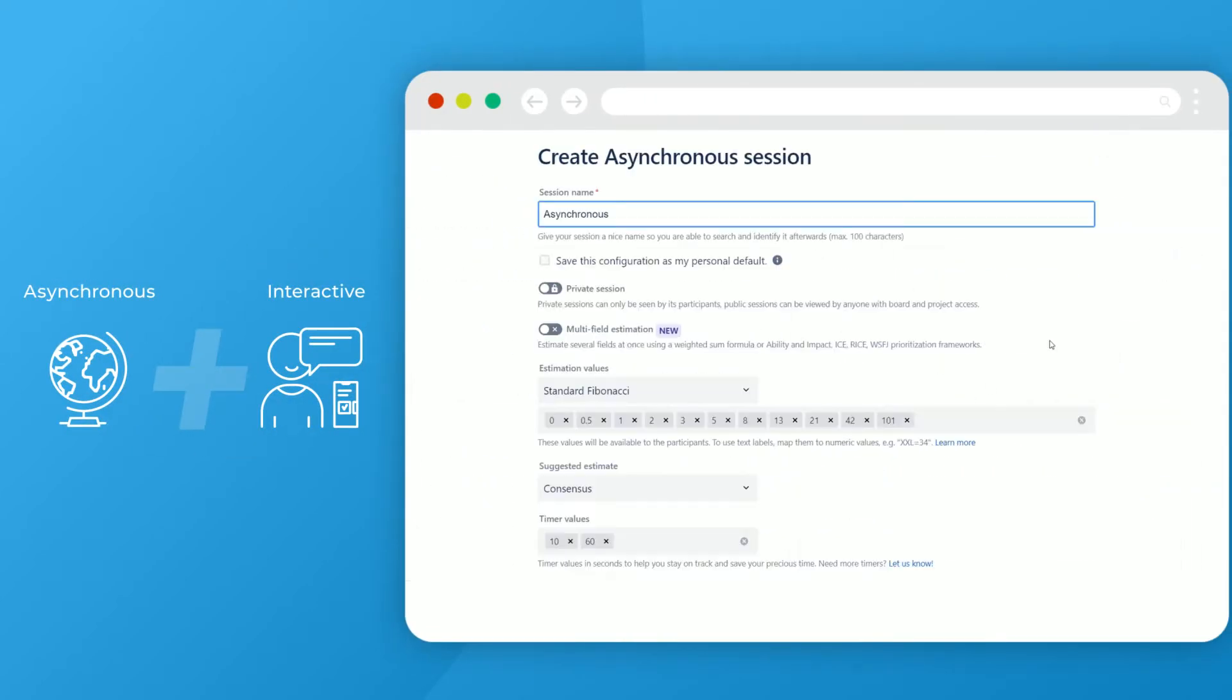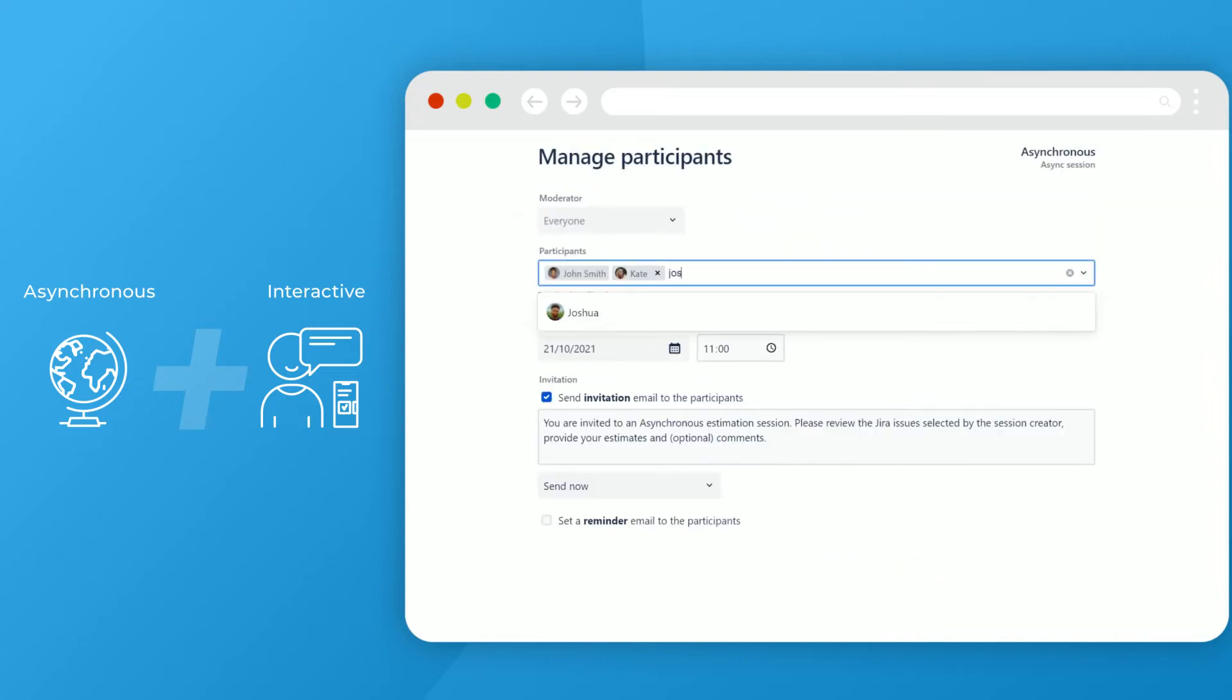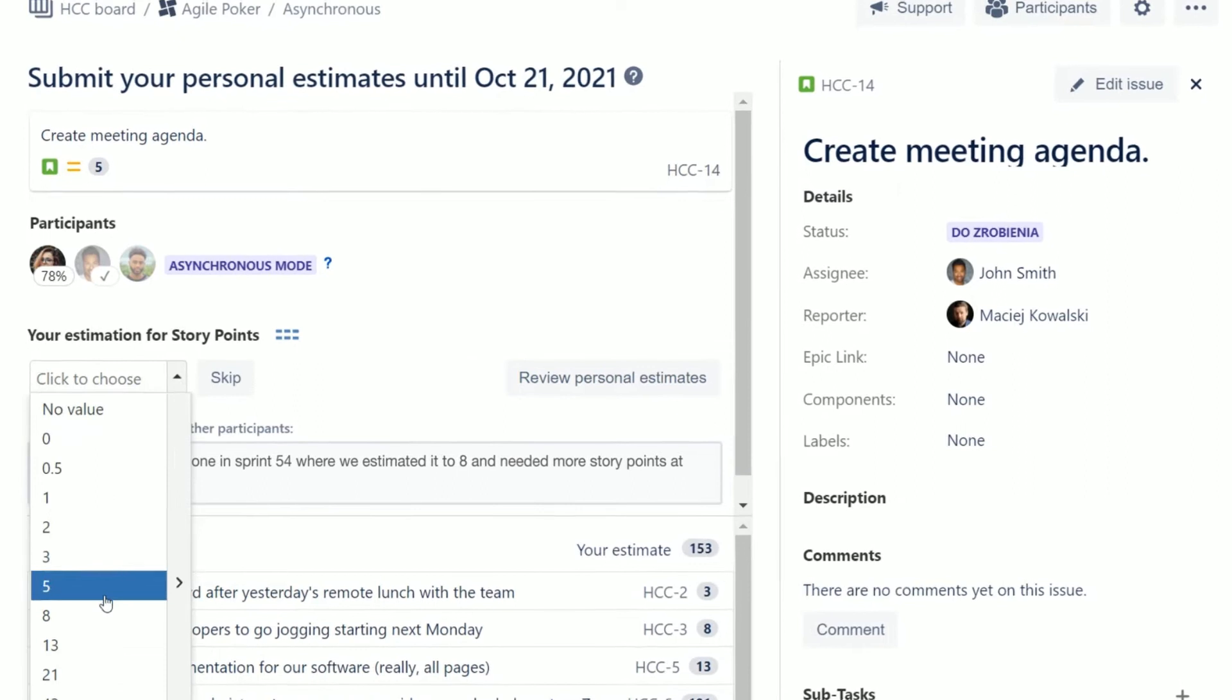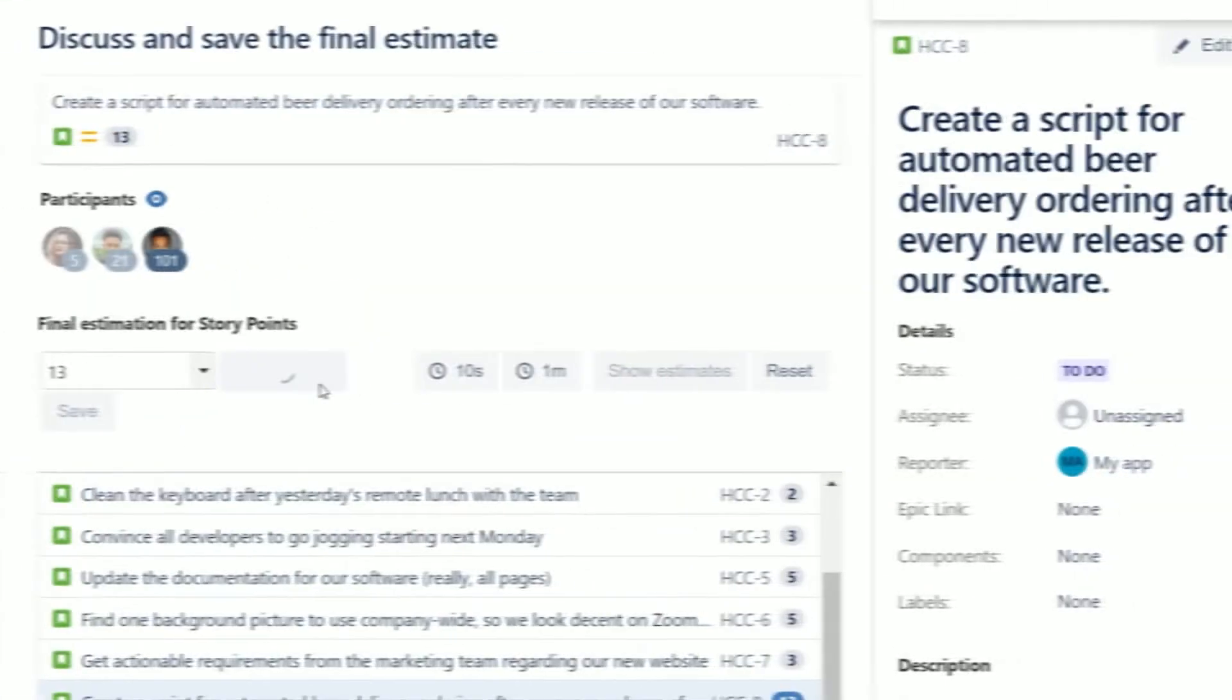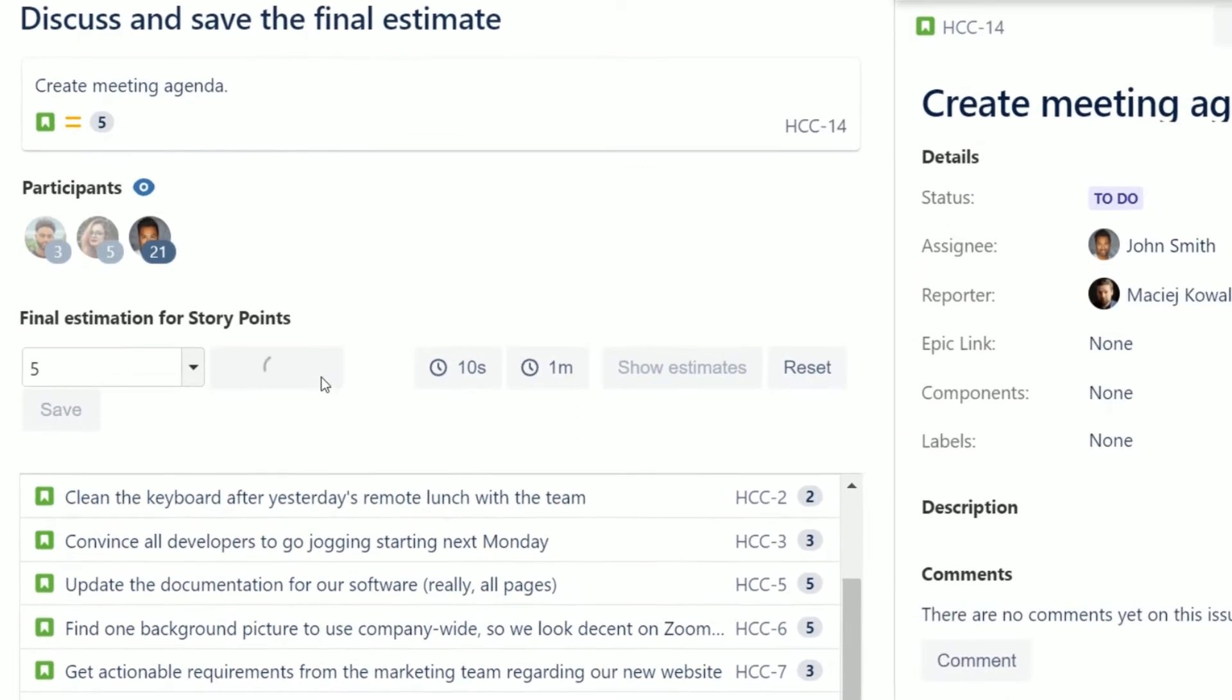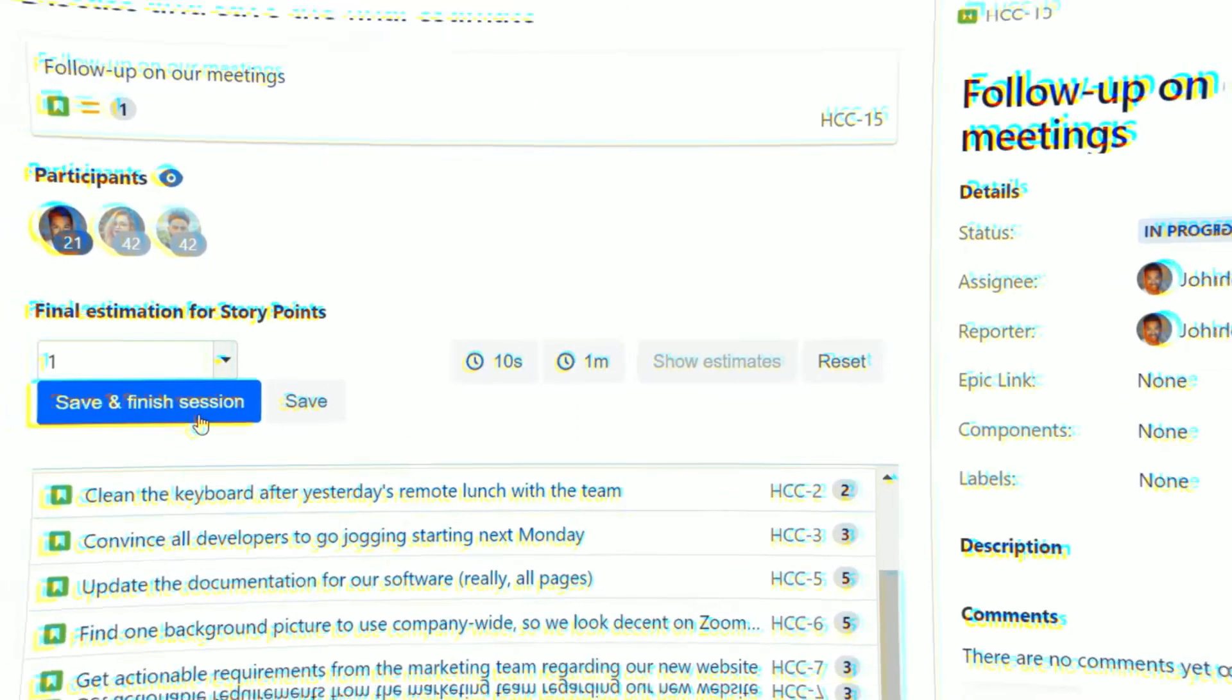Moderator chooses stories, creates a session and shares details with the team. The team then provides personal estimates at their own time before the due date. The session moderator submits final estimates based on provided personal estimates and comments.